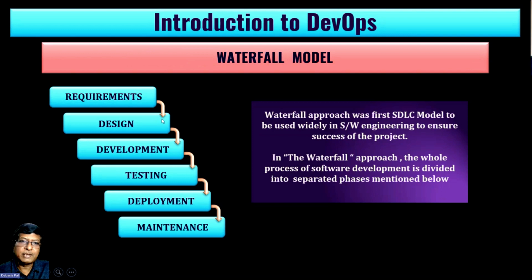The waterfall model fails because of its very rigid approach. It has a basic assumption that I will not fail, everything I do is perfect. It is a happy, optimistic planning. This optimism does not work in a practical way. There is no backward movement, that means it is not cyclic. It is very difficult to go back, because it proceeds on the assumption that everything was done correctly in the previous phase. There are many approvals and so many steps, but the basic assumption is that we are going to succeed, and that assumption is faulty.